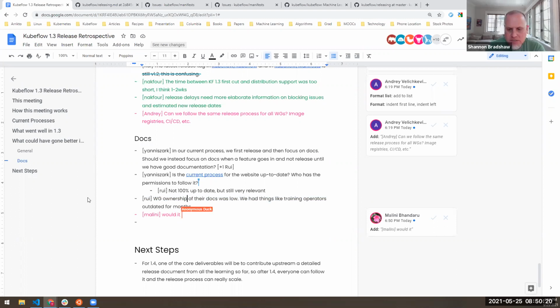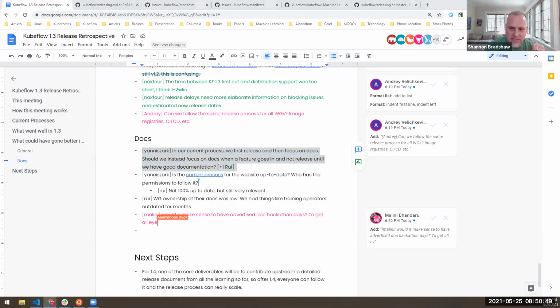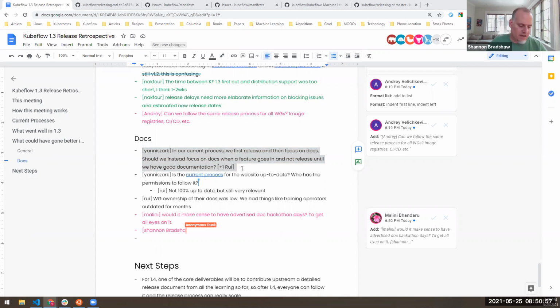So could we go back to the first point just for a minute? I think we would benefit from, when a feature is documented in terms of the software work that's going to be done, also spending a little bit of time laying out what needs to happen in the documentation in order to effectively support that feature in the docs. If it's an update that's going to actually make some of the documentation incorrect, we should call that out. If it's brand new, typically that's a little bit easier, but then we need a little bit more of a description as to how this is going to affect users in order to guide the development of documentation. So just a little bit more thinking up front about the impact on docs for any software feature that we're building.